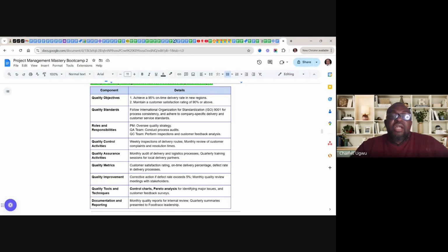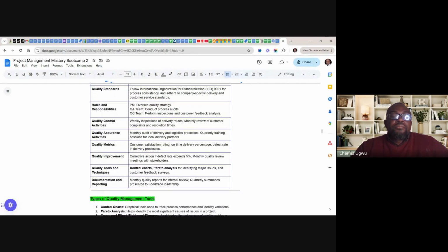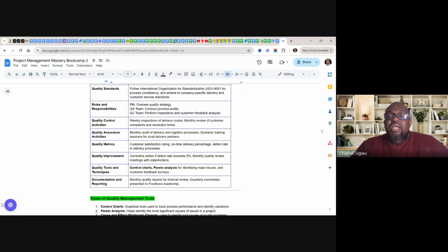Quality assurance activities: monthly audit of delivery and logistics process, quarterly training session for local delivery partners. Quality metrics: customer satisfaction rating, on-time delivery percentage, defect rates in delivery process.